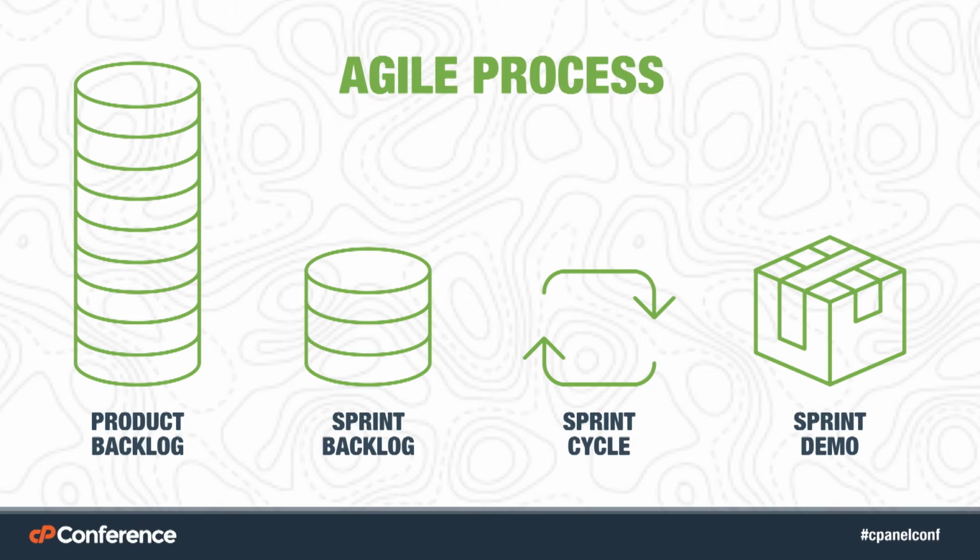Typically these are 2 to 4 weeks, and at the end of that you have a demo where you show all the work that you just completed to your stakeholders. At this time your stakeholders can give you feedback and say, this is great, here's what I would change, this doesn't really meet the objectives. This is a good time for the team to get that input, and you don't get 6 months down the road on a project or have a website ready to launch because you've shown it every 2 weeks or so.